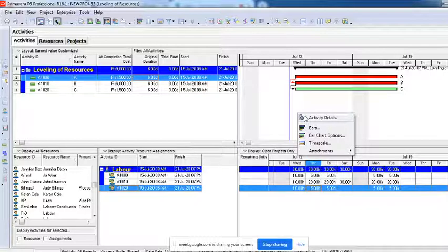How do I distribute it while ensuring there is no over allocation? There should not be any over allocation, because this is the sheet which you will have to take a printout of and send to your project manager. Your project manager has to send it to your client, and the approval has to happen from their side, because one copy has to go to the labor contractor, as he has to arrange so many people on that particular day. You're committing to it.